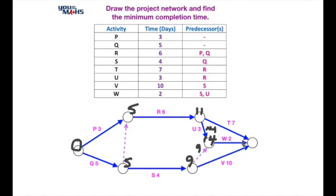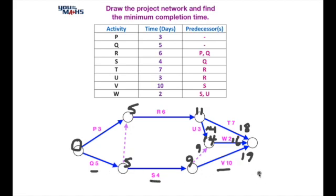We've got three arrows checking towards the final node: eleven plus seven for T is eighteen across the top; fourteen plus two for W is sixteen in the middle; and nine plus ten for V is nineteen across the bottom. The largest is nineteen. Tracking back, the critical path runs through Q, S, and V, and the best time to complete the project is 19 days.